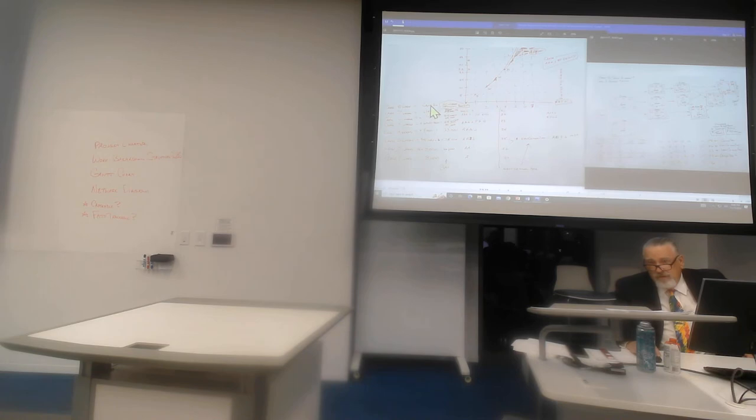So if you crash A 3 times, right, your new critical path of A, D, G, J, if you crash A 3 times, it brings it down to 20. You're right, so I don't need to crash G ever. Correct. I wasted $16,000. You did. Okay, it's $7,000. I wasted $7,000. So I came up with a cost of $87,000, and it could have been done for $80.